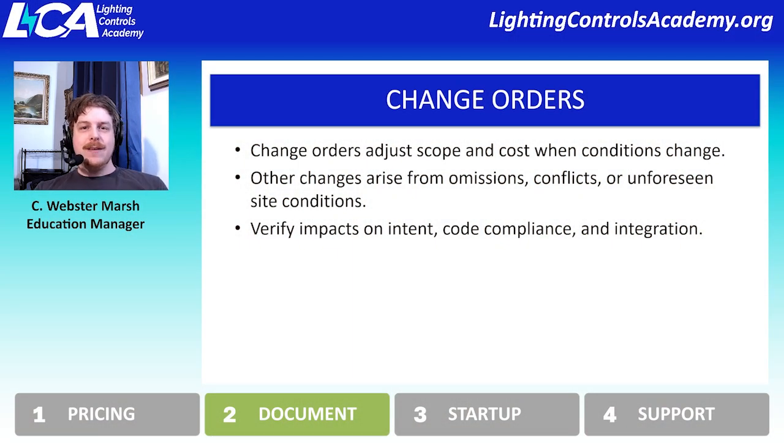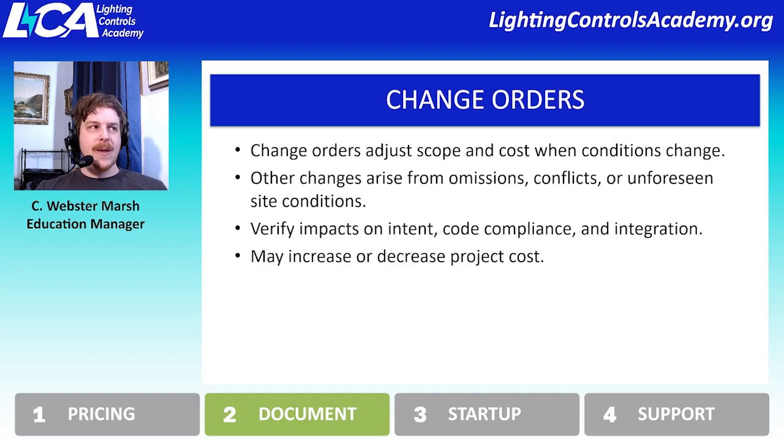And then additionally, if integration has not been vetted, if it's just a big question mark of, we know we want integration on this project, but we never really clarified exactly what that integration is going to be, that can really make things quite challenging to the project. And so, again, there might be a change order that involves even hiring an integrator, which was never included in the cost of the project to begin with. And so, oftentimes you'll see change orders increasing the cost of the project.